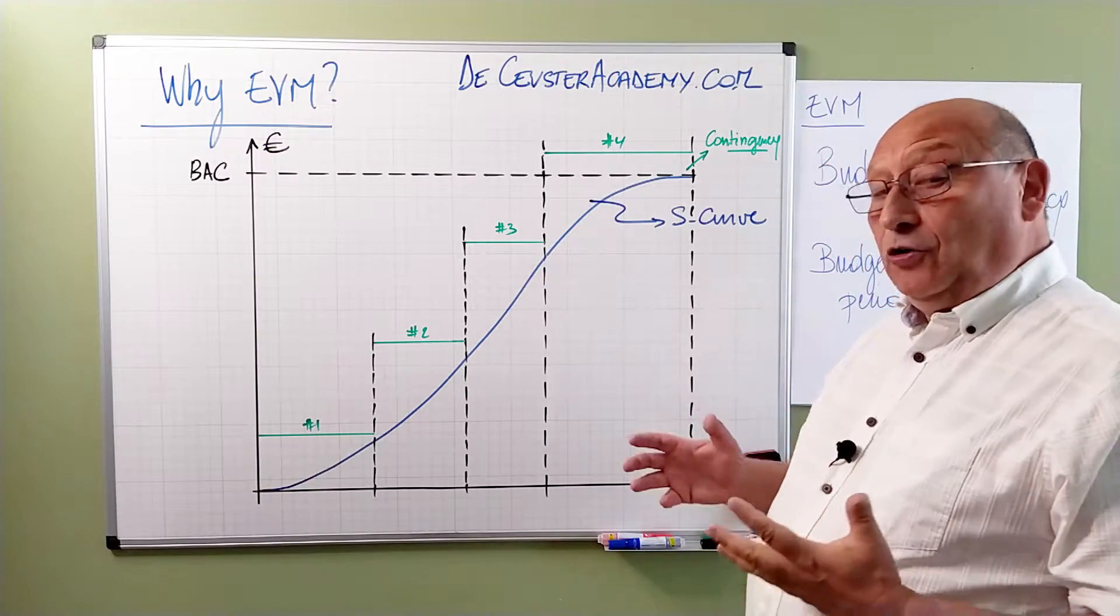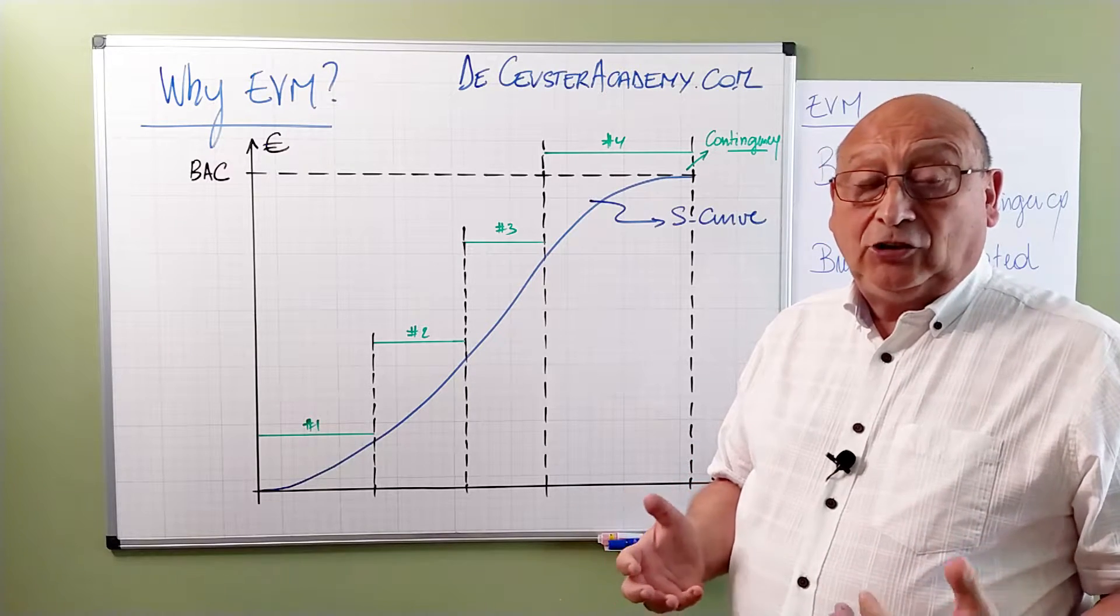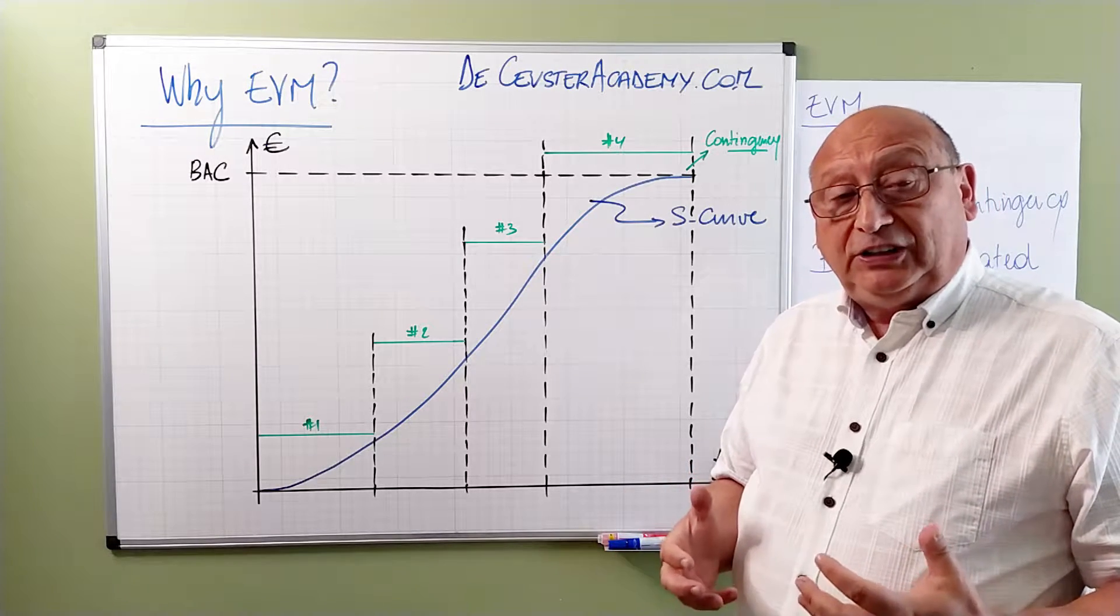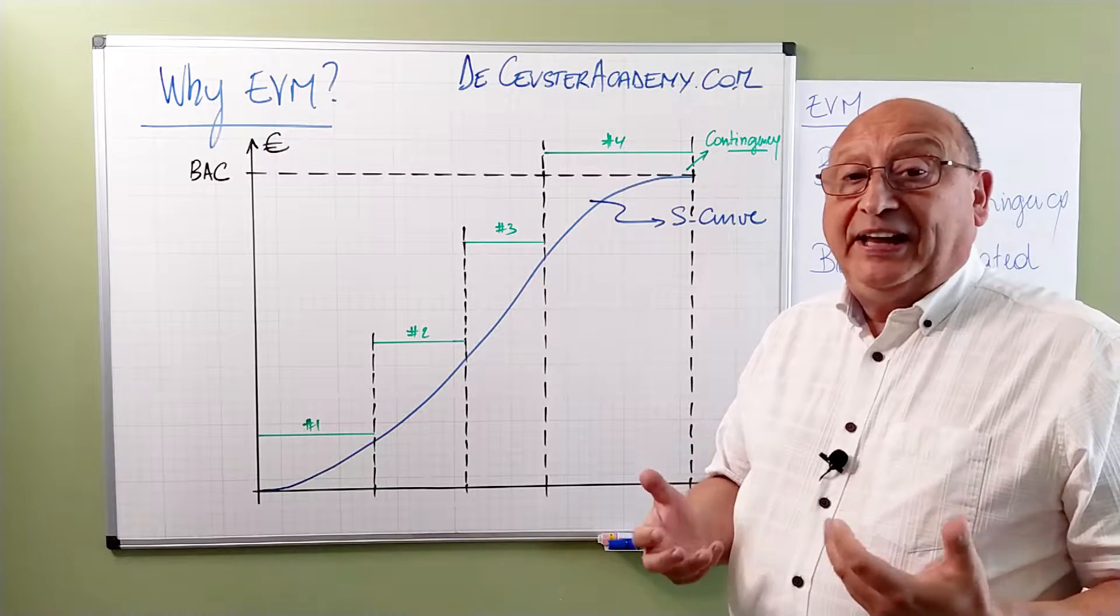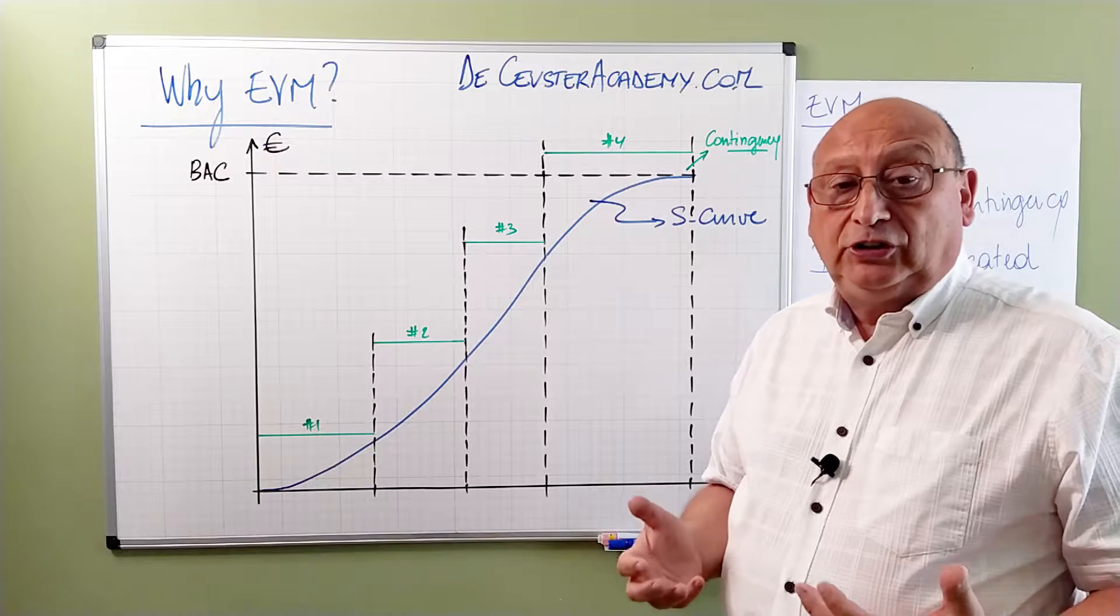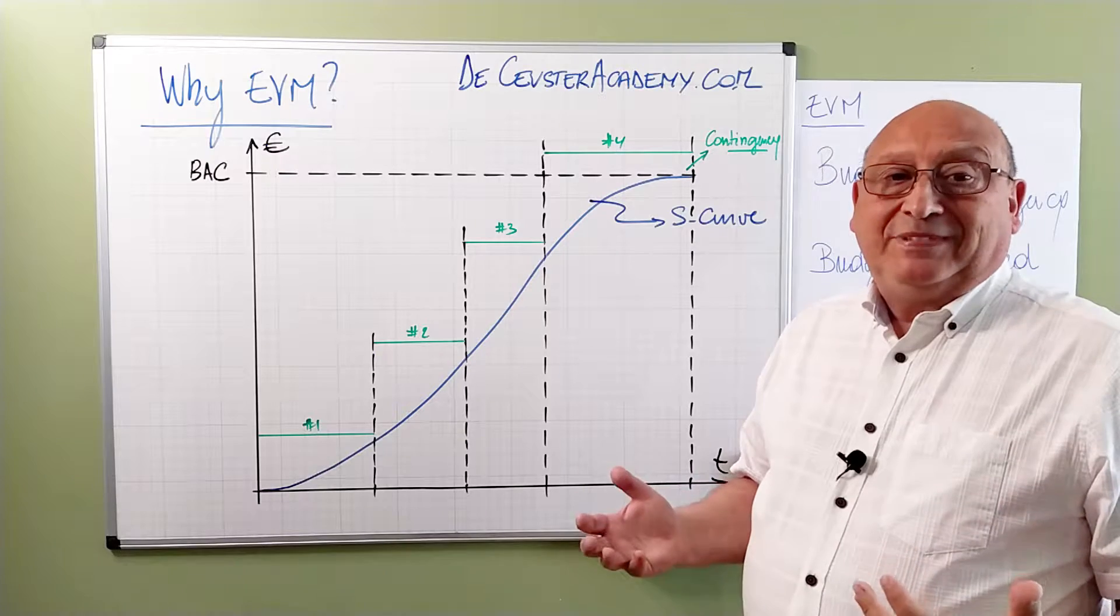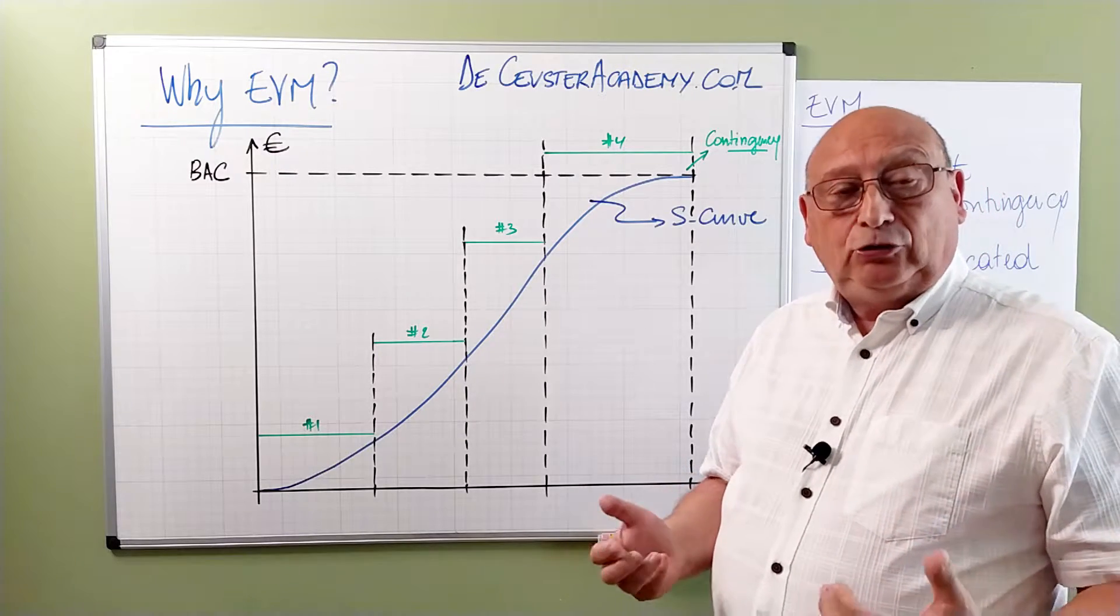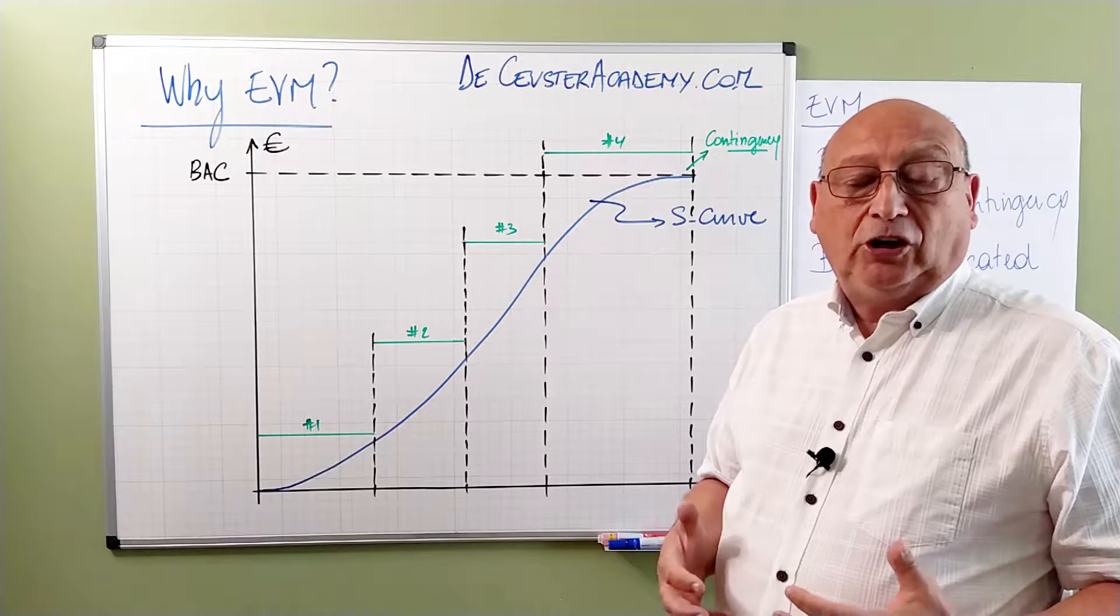Now we don't have the management reserve as part of the budget. Why is that? Because management reserve is reserved for things that are not included in the original scope of the project. We can make a decision to add it to the scope, but originally it's not part of the project as such, and it's not part of the budget.